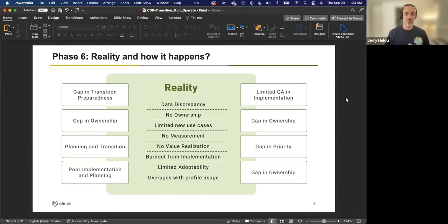When you are planning the use cases, one of the things that you should be planning is, how do I measure the KPIs? How do I measure that we hit the business objective? Where does this measurement need to happen? So do that early on.